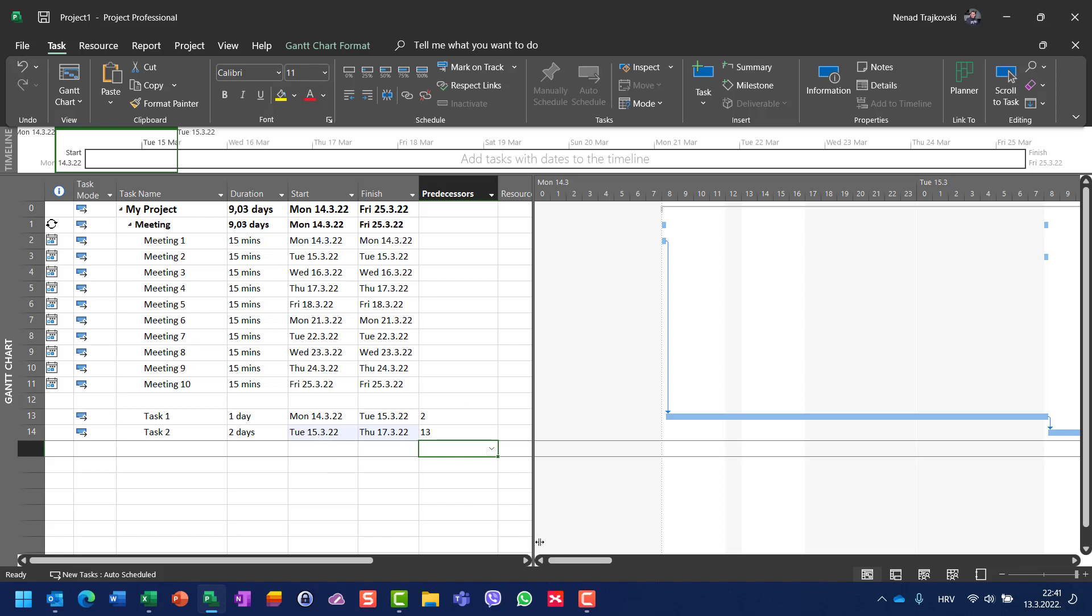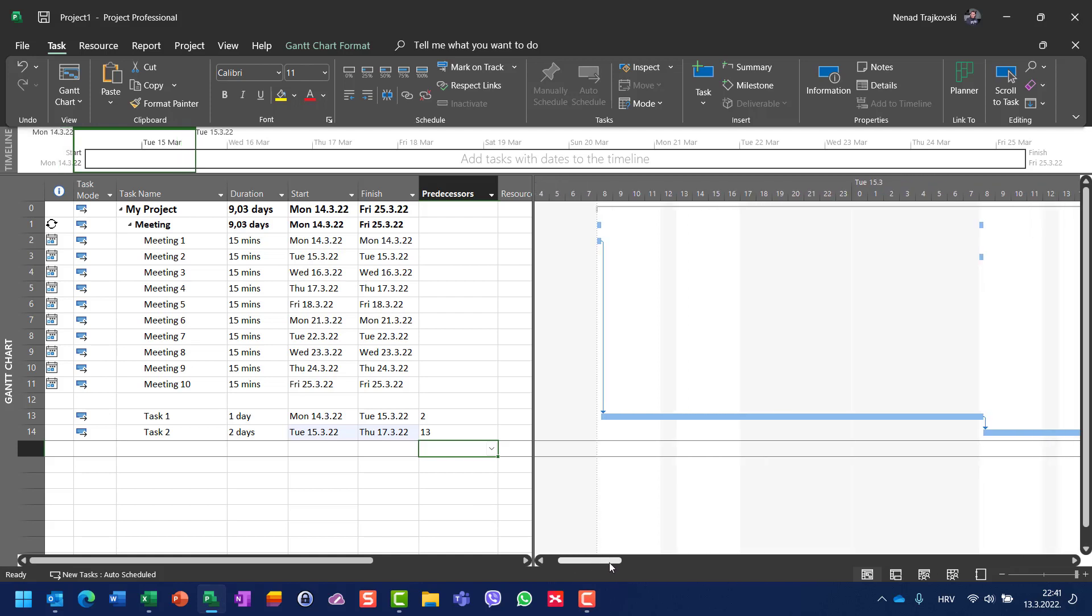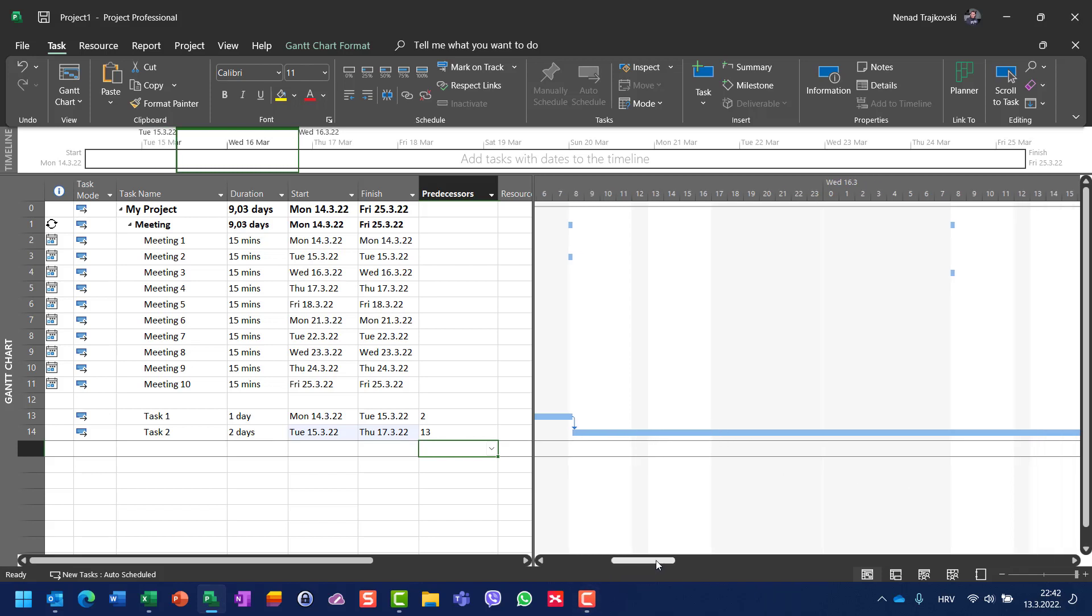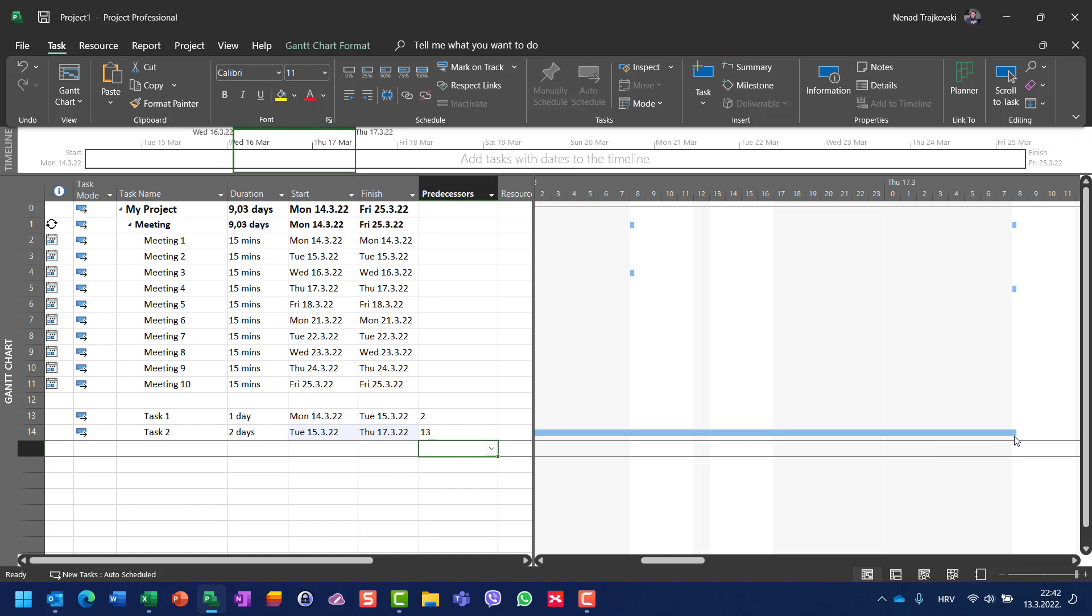Here you will see that it will start at Tuesday but it will finish on Thursday. Why? Because that task will start after Task 1 is finished, which is on Tuesday at 8:15. It will last from Tuesday 8:15 till 5 o'clock, then from 8 to 5 at Wednesday, and those 15 minutes missing are going to be worked on at Thursday.